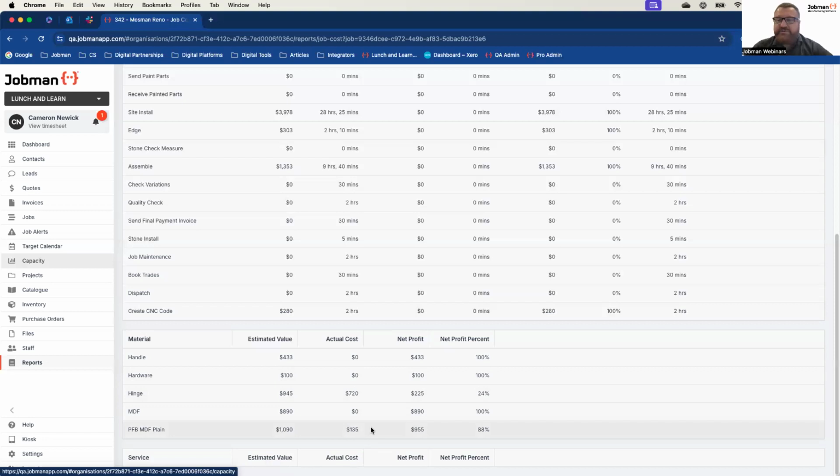I don't think I've actually put any services in my job, so I'm unable to see the report at the moment, but the same thing would happen here because services are purchase orderable. So if you have services built into your software for project managing, electrical work, delivery, all that sort of stuff, and that's things you purchase order out, contract, install, we can then break it down and say, hey, when we sent out the quote or the original tender for this job, the contract installer came back and said it was going to be $2,000. When we received the bill, it was $2,500.